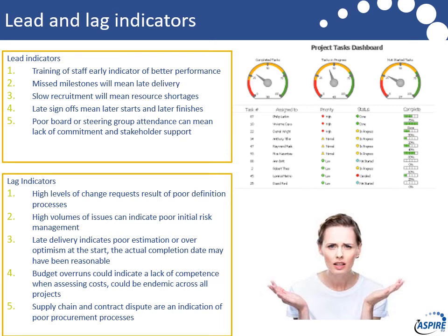Poor board and steering group attendance is another one, quite often underestimated. And some time ago, we came across a customer that actually, if the sponsor or the program SRO didn't turn up for the program board, it automatically went red as a report. Now, I thought that was fantastic, because that's definitely going to keep the attention of your SRO. But if they're not committed to turning up and making you their top priority, are they the right SRO?